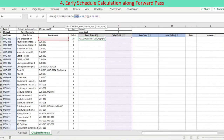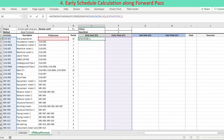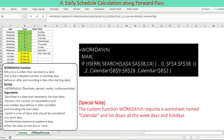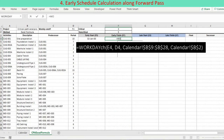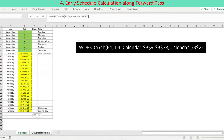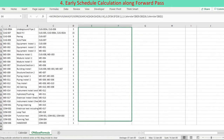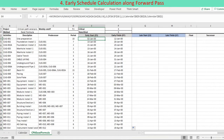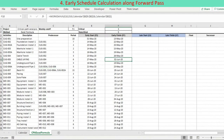The activity's start date should be one working day after the predecessor's latest finish date — one day after means plus two days to include the reference date. For this purpose, the custom function WorkdayCh is used, where the argument period is set to 2. Early finish date, abbreviated as EF, is calculated with the calculated ES, considering activity period and non-workdays: EF equals ES plus period plus non-workdays, using the modified Excel workday function WorkdayCh. Formulas for ES and EF entered in the first activity cells are copied down to the last activity cells. Enter the start date for activities without predecessors.